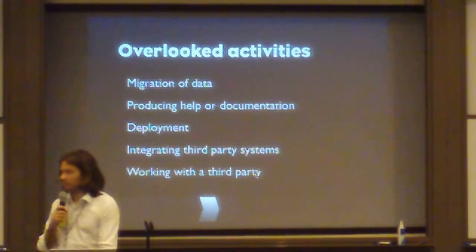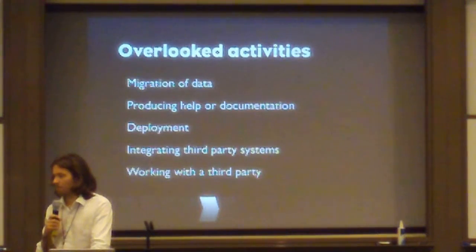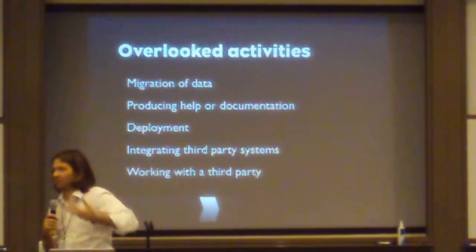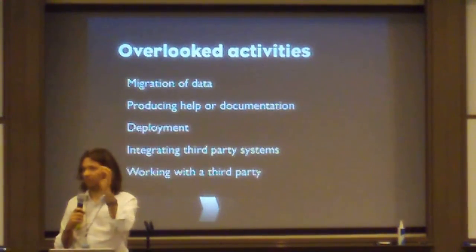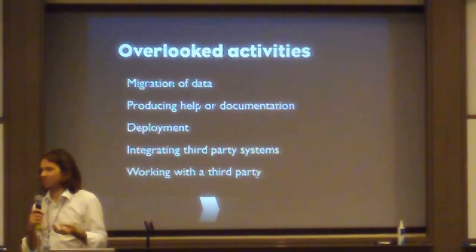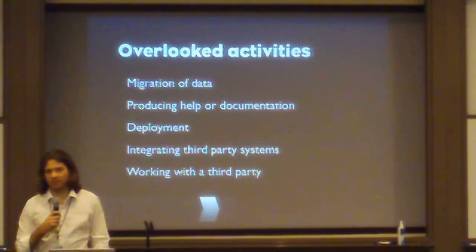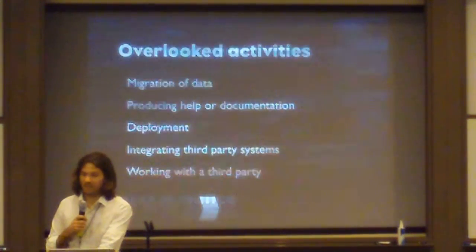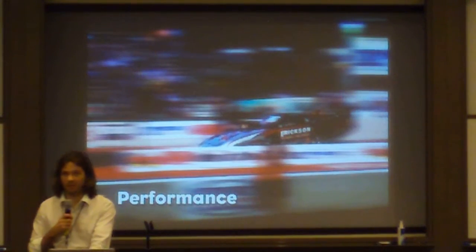Are you saying that on your estimate, you list these separately and say these are just going to be what they are? Some of these things we'll list separately. I'll show you shortly how it works. Some of them you will have to include in your feature estimate. But we try to keep our features as ideal as possible, and all overhead time we add extra. We specify it. It's better for the client. It's clearer to see.